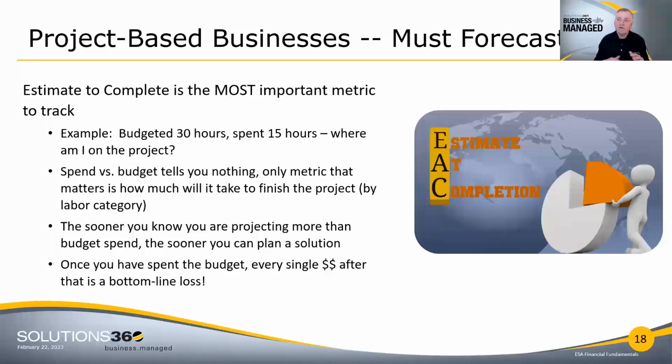So that all falls under one leg of the most important things we try to teach our customers and our clients in this industry, which is track your projects. The second one, though, is how much am I actually tracking? So I have an hour applied to the job. How much does that hour cost? And this goes into an area called burden, which is where I'm allocating things to a project that are not specific to that project, but I can accurately assign to the project because the use of them across all my projects should equal 100% of their cost.